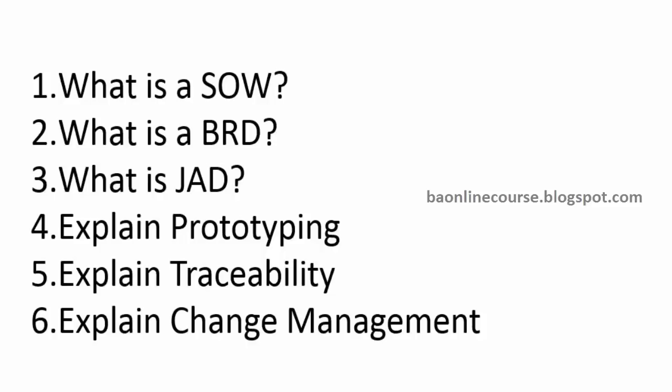So how big could a BRD be? Like how much could it weigh? How many pages? It could even get into hundreds of pages, depending on the complexity of the application. If it's a small application, it could end up 20, 30 pages. A large complex application could even get into hundreds. So you are capturing details about each and every requirement. Usually you'd have the use case diagram and then the description for capturing the functional requirements. Then there will be a lot of non-functional requirements as well. So that's how you would capture it.